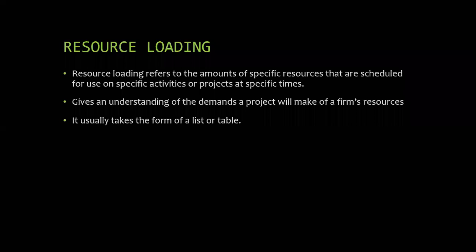And at a specific time, when the other parts are completed, that means the foundation is completed, the column and beam are completed, the wall construction is completed, and when I want to go for slab formation, then I want that particular machine. At that time only I will call that machine.